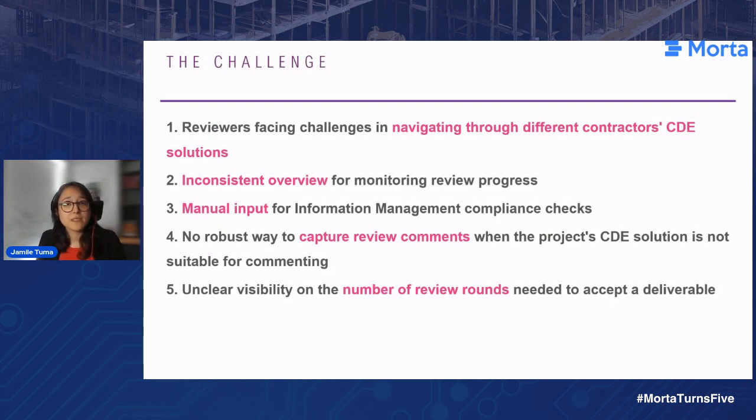and manual input for information management compliance checks. Now I say manual input because the way we would run compliance checks previously would be to go on the CDE, get a report manually, run that report through an Excel tool, and then get the results fed back to the contractor and to whoever necessary. Should there be another batch of uploads, we would have to go through the same process again. And that manual aspect of it, Morta has helped us with.